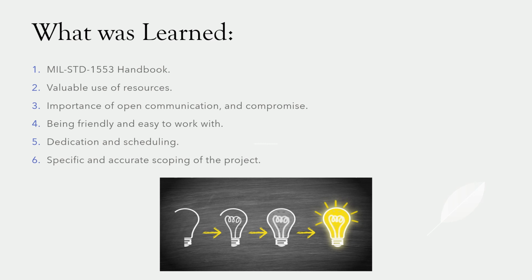And finally, specific and accurate scoping of the project. Again, a testament to Grand Valley's professors. They really made sure we wrote our scoping document detailed. This meant that scope creep, even though it wouldn't have been a problem from our sponsor anyway, was never seen, and we didn't need to worry about the project spiraling out of control from things that other people wanted to add.